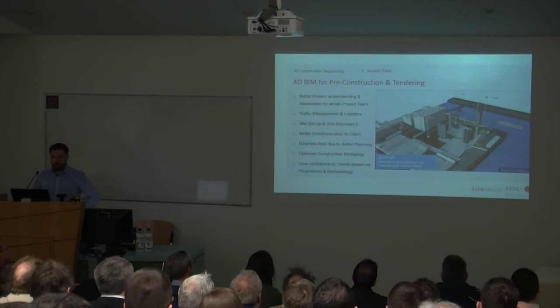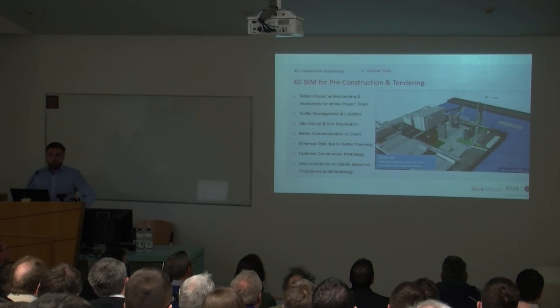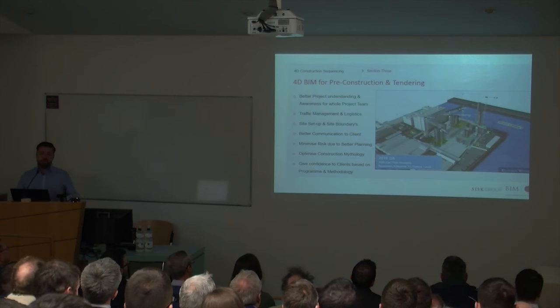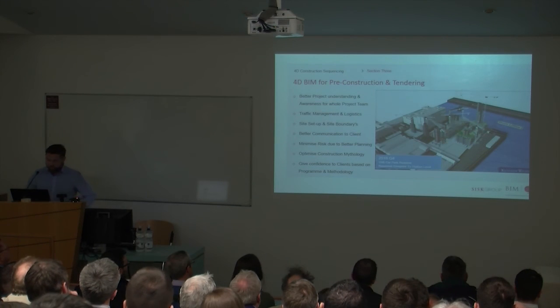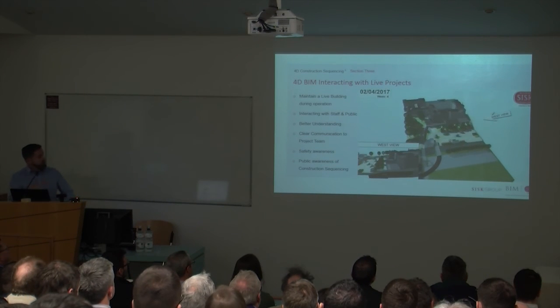And there's a number of different contracts that would be involved, and this seems to be a big part of it. A number of the big public works contracts is now becoming a requirement that you either have to provide a 10-minute or 3-minute long construction sequence of how you're going to go building to building. Essentially, that's a 4D BIM model, and now it's becoming contracted into the projects. So tight for time here, but I'll just give you a quick overview. There's a couple of examples here.